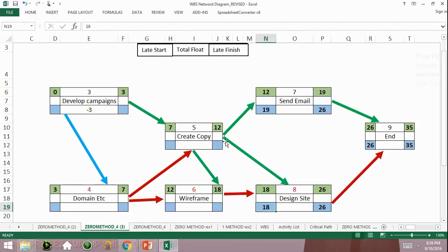Remember the rule. You've got a point of divergence. You always want to choose the lowest late start. And in this case, it's 18. So 18 goes here. Subtract 18. Uh-oh, hang on a second. It even deceived me. We shouldn't actually take that 18.